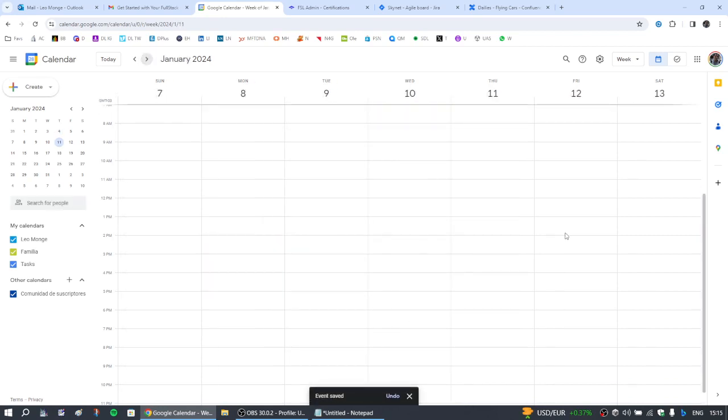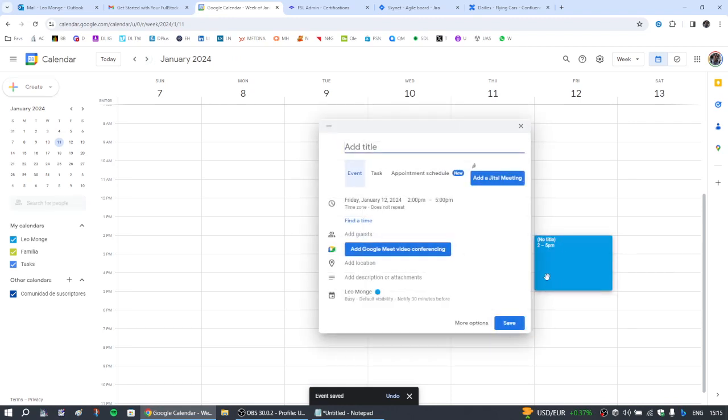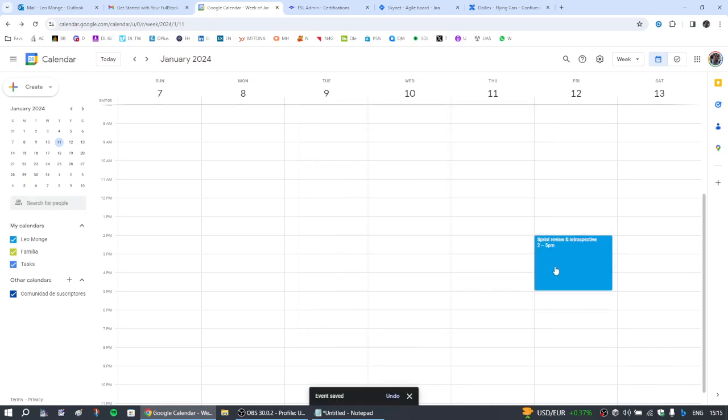And finally, we have another thing that we will do here. I usually do it on Fridays, which is the sprint review and overview. Retrospective or overview, as you wish. Retrospective. So we save it. It could take even a little bit more time, doesn't matter, but I try to split the meeting in two. When we finish the first one, we start the next one.